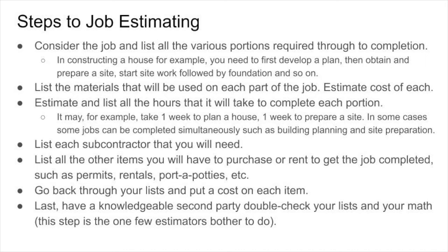You've got to consider the job, first of all. With any given job that you estimate, you come in, you look at my house, and you say, okay, you want 4 rooms painted, Paul. Here's the type of paint you want to use. These are the various considerations. You break all that down. So room 1 is so many square feet, room 2 is so many square feet, room 3, so many square feet, room 4, so many square feet. Based on that, you can estimate the total square footage that you would have to paint and convert that into how many cans of paint you're going to need, how much time it's going to take to do, and so on.